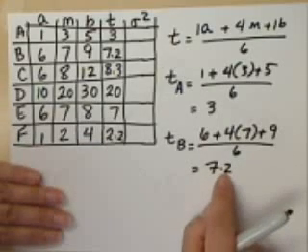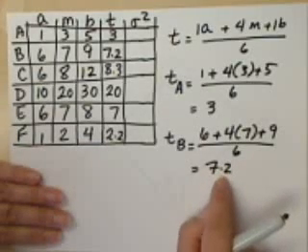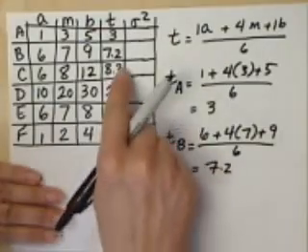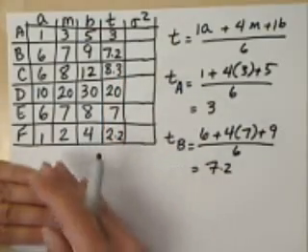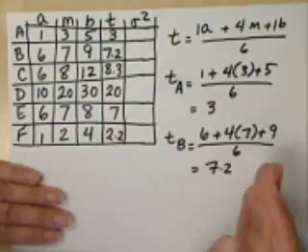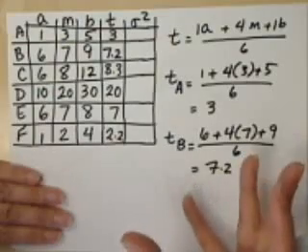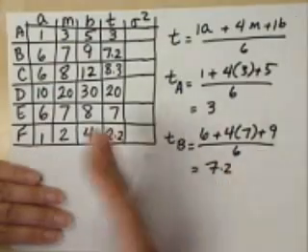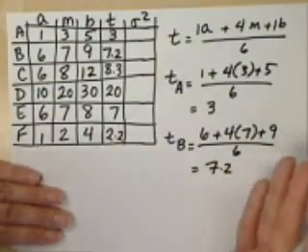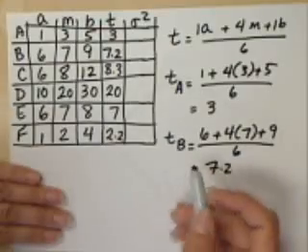Keep in mind 2 things. Number 1, you don't want to round off the 7.2 or the 8.3 or the 2.2, because ultimately for each activity you round off their expected time or average time. By the end of the project, there will be some inaccuracies built into it. Also note one more thing.